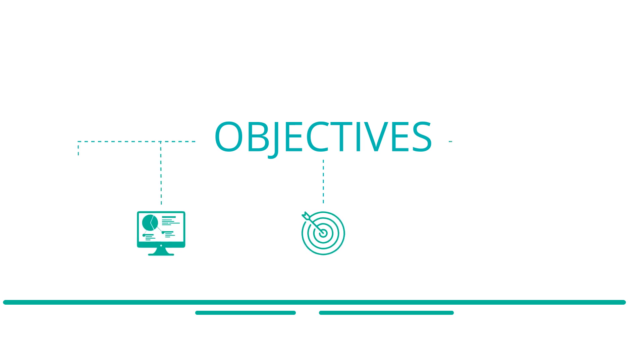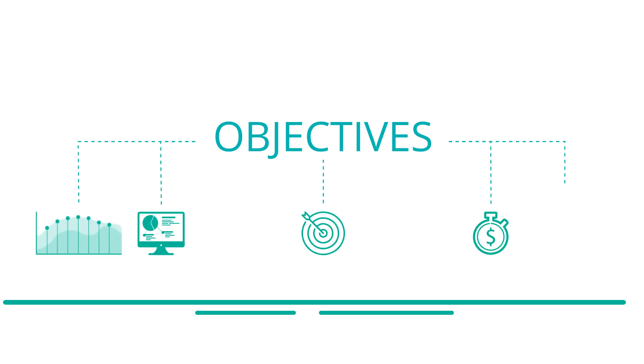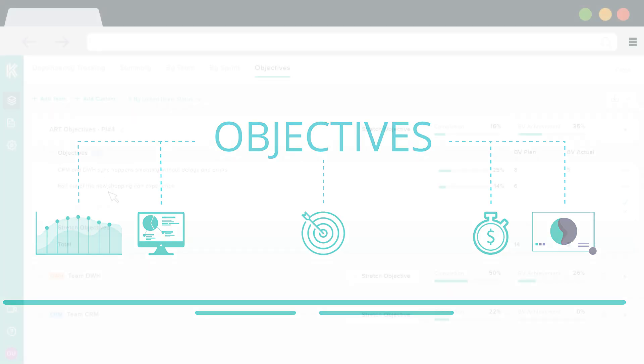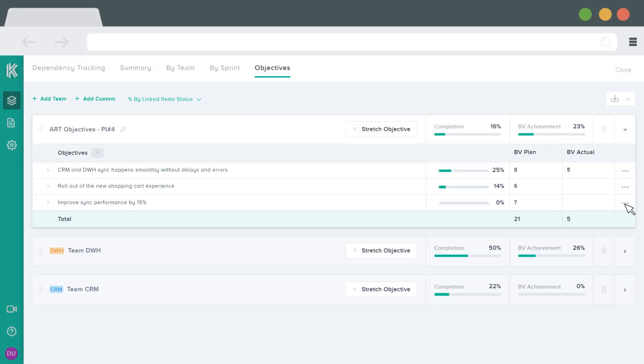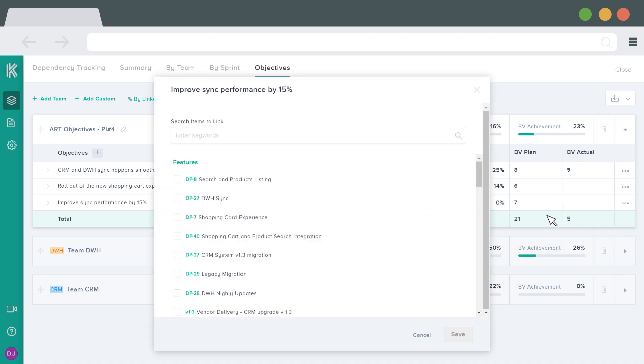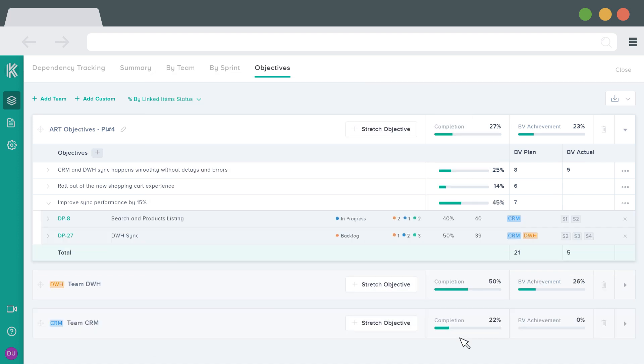Objectives. Objectives are a summary of the business or technical goals for the release train. They are what the program or agile teams intend to achieve in the current program increment or PI. With Kendis, you can set the business value score for each objective. Additionally, for better tracking and visualization, you can also link objectives to features that are present on your board to measure the progress of the objective during the program increment.